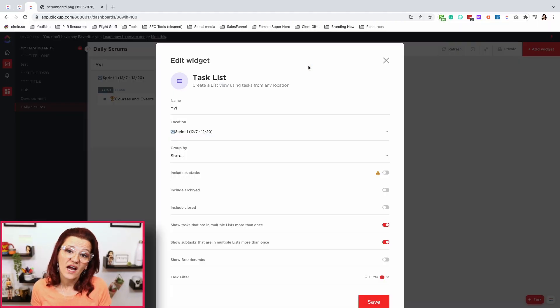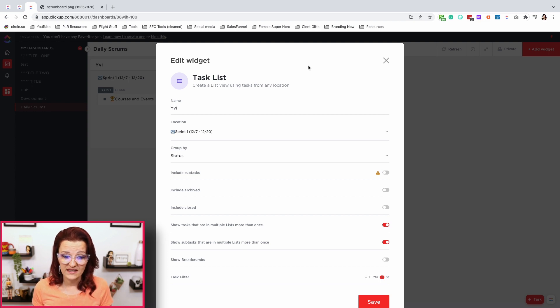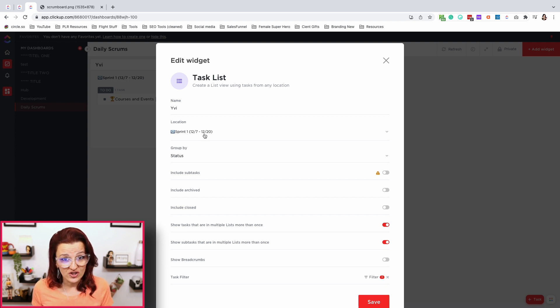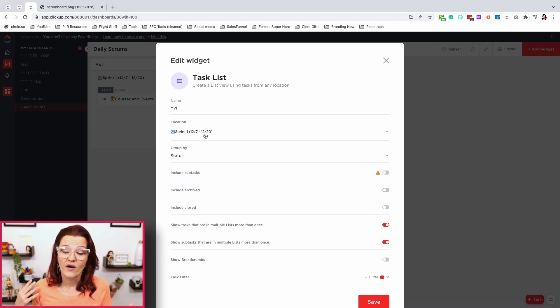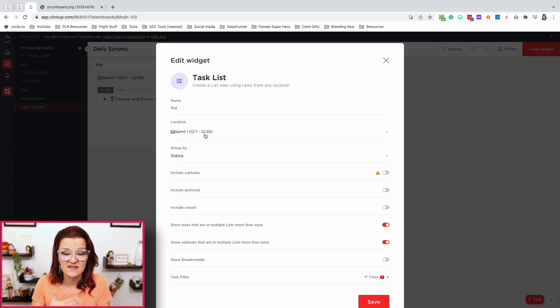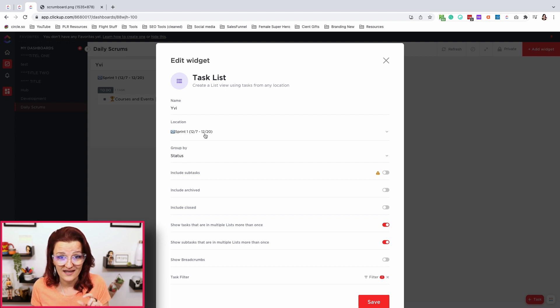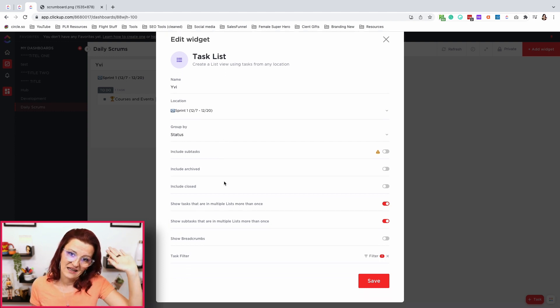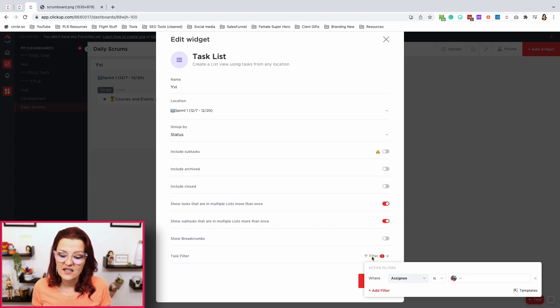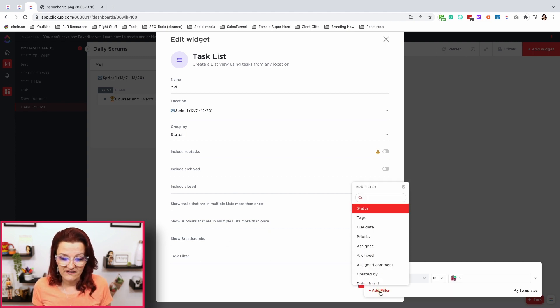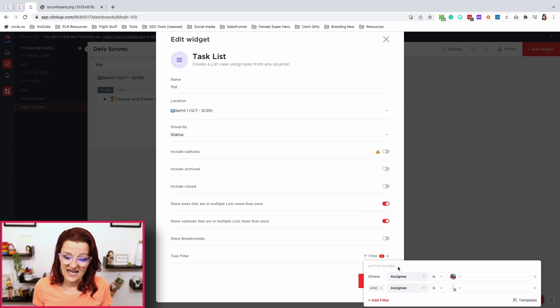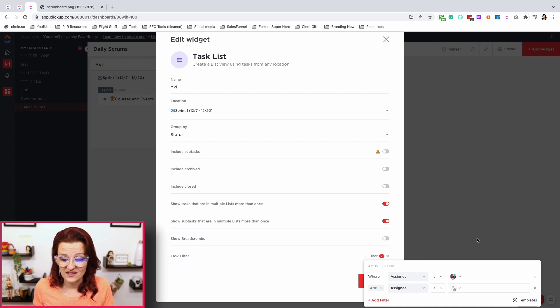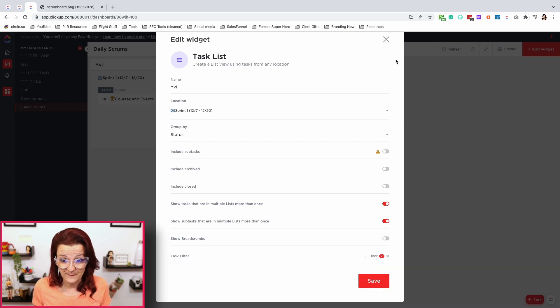Again, we are using the task list widget right here. We are getting a little bit more fancy though with filters this time. Choose your sprint location again. So again, make sure when you are starting new sprints to have a task to go into your dashboards and update those to your current sprint. That location needs to be updated. With that again, go through the settings, set it all up how you need it. And then in your filter, you add a filter that says assignee is and choose the person you want to see the tasks for. In my case, it was me.